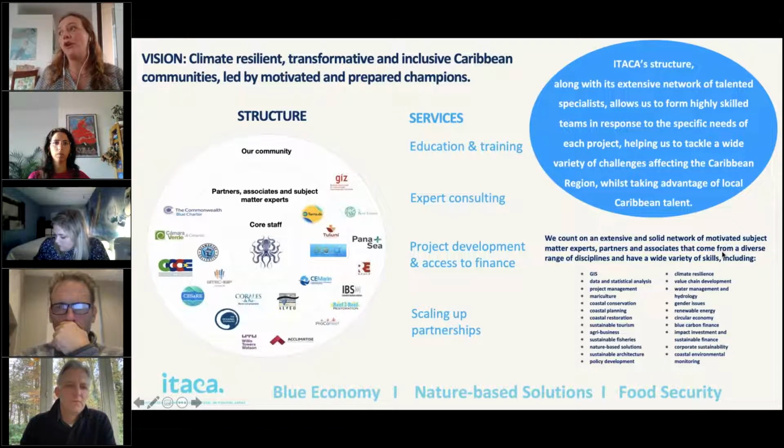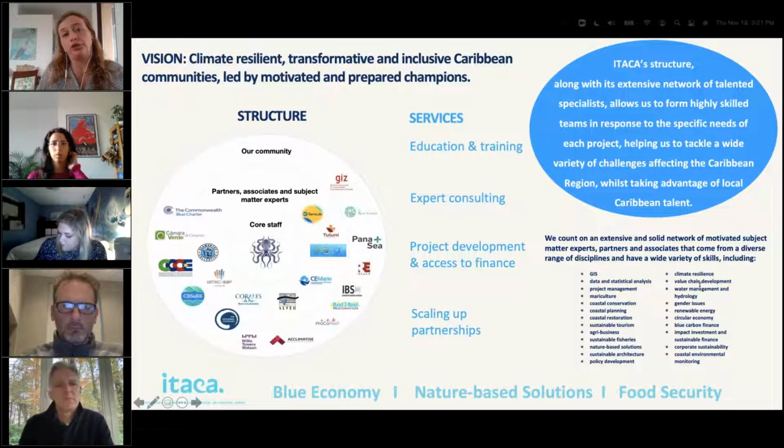They hadn't done a very detailed budget breakdown. So 6 months in, they realized, oh gosh, we have 12 months to finish this project, and yet we're not yet in a position to show the results that we want, because we haven't organized our budget and our schedule correctly. So we came in giving expert consulting as project managers.